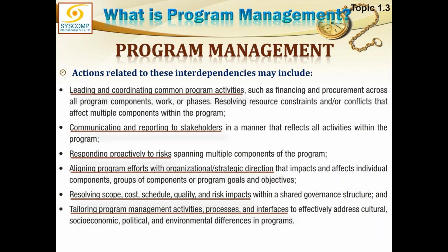Every project will have its own procurement management plan. But what if many projects require to procure similar items? So that kind of responsibility where commonality exists in procurement, or for that matter in anything, for risk management also, program activities will take on that responsibility.